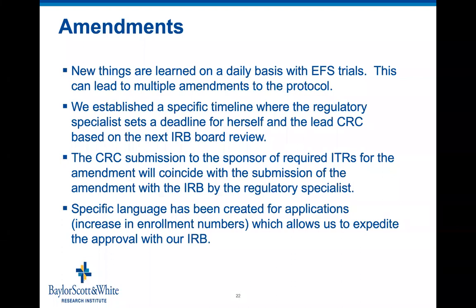Amendments. So new things are learned on a daily basis with EFS trials, and it can lead to multiple amendments to the protocol. We've established a specific timeline where the regulatory specialist sets a deadline for herself and the clinical research coordinator based on the next IRB board review. And the CRC submission to the sponsor of the required training records for the amendment will coincide with the submission of the amendment with the IRB by the regulatory specialist. This way, we can almost guarantee when we get an approval for this amendment that we will be ready to get the green light also from the sponsor at the same time.